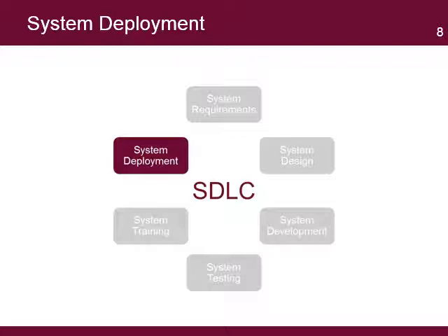System deployment. In this final phase, the system is installed and made operational. The phase is initiated after the system has been tested and accepted by the users. Activities in this phase include the notification of implementation to end users, the process to enter new information, the assignment of user roles, and the support and maintenance procedures.